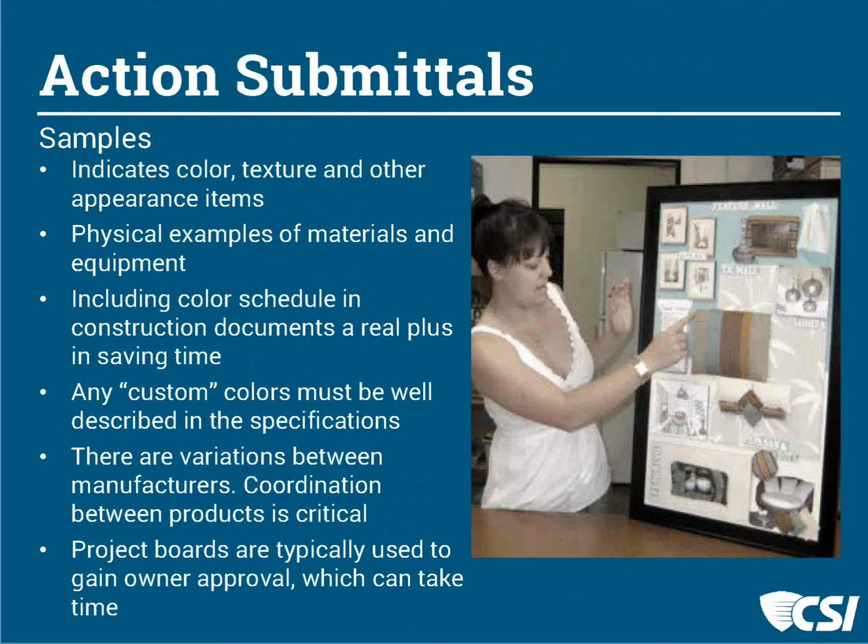There are variations between manufacturers, and so often these samples are used to obtain owner approval, which can take a lot of time again, and needs to be, in reflecting back to the submittal schedule, a component that you measure into what's going to be required for your review time. So they would need to be particular to the manufacturer and be coordinated between various products.